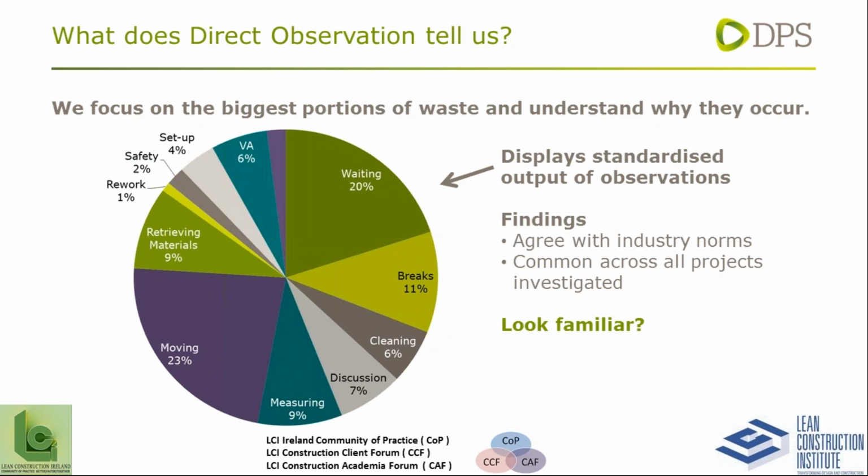Those using mobile units, specifically tablets, have a distinct advantage because let's say you get a clash in the field and guys are there discussing how are we going to work around this, what are we going to do, what can we change. If somebody's there with a tablet, they can look at the model and see what the options are straight away and come up with a solution in a very quick time frame. So I would say definitely BIM is something that stands out for me.